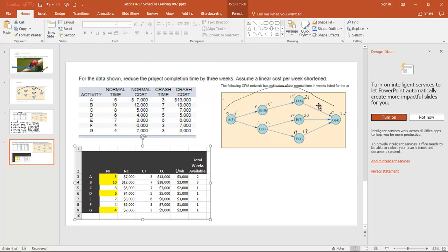Okay, so now how do we handle this? We know that our critical path is up through the northern route here. It's a total of 25 weeks. Okay, and so we need to shorten the overall length of 25 weeks by 1 week. It doesn't pay to reduce any of C, E, or F. We don't want to reduce them first and pay for something that has no effect, because if we shorten these up, they're already shorter, and that doesn't affect the overall time it takes to get through the network.